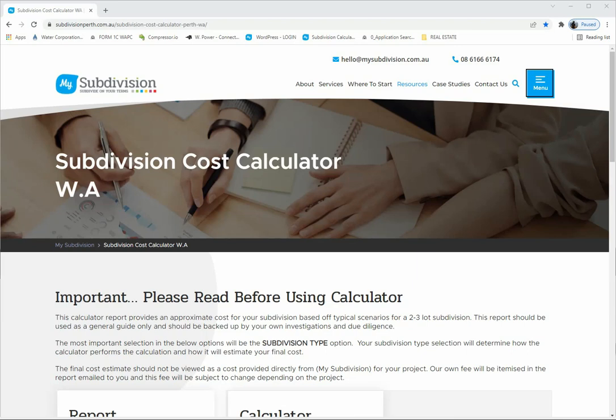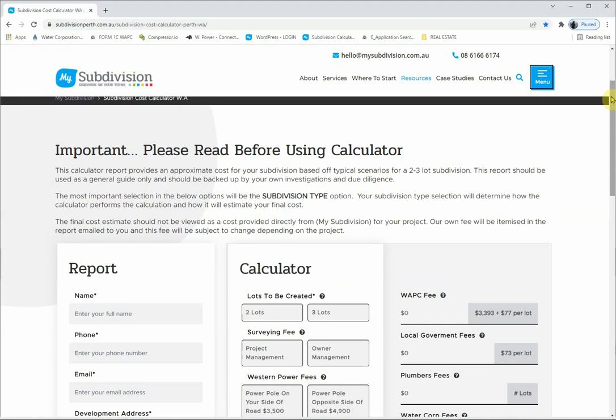Hi guys, this is Kevin from My Subdivision. I just wanted to throw together a quick video on the subdivision calculator that you can find at the My Subdivision website. Basically the calculator is designed to spit out a report for a two or three lot subdivision. We've tried to factor in all of the things that come up on a typical subdivision — water corporation, Western Power, surveying fees, project management fees, plumber, electrician fees, fencing, demolition, removal of carports, construction of driveways — we've tried to roll it all in.